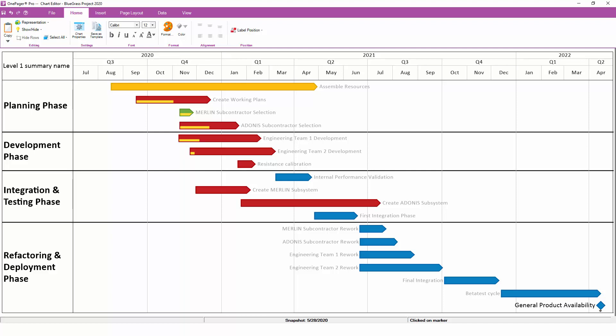Second, changes that you have made manually usually cannot be saved back to a template. When you make changes manually, those changes apply to specific tasks and milestones in your chart and are not being made in a general sense. OnePager templates that you might want to share with colleagues do not contain any task or milestone data from your project, only general settings.